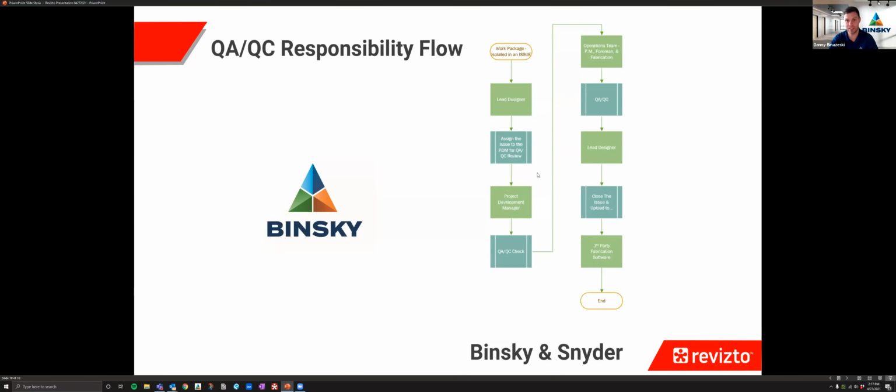The lead designer, who in this case is Barry, is going to assign the issue package and kick it to his PDM, his project development manager, who in this case is me. You heard him reference that. What I would then do from that point on is look at the piping and go through Binsky's internal QA/QC check. I would then take that original issue that Barry assigned to me and assign it to our PM. He would then follow the same QA/QC check along with his foreman and our fabrication team. Once that QA/QC is done on their part, they would then assign the responsibility back to Barry, knowing that the loop was complete.